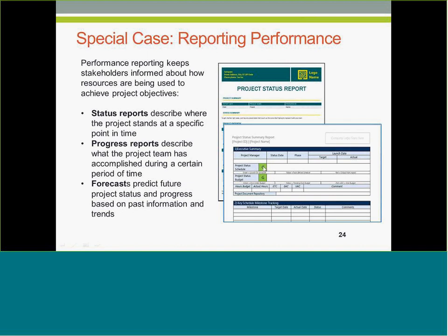Now, project status reports and performance reports often have to be very short and very visual because the recipients of these reports often have 20 or 30 of these reports to wade through during a week. This means that we need to ensure that the visuals are really easy to read. This is why stoplight colors are always really great.